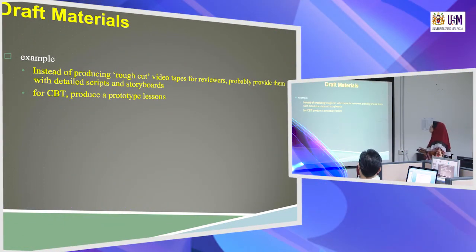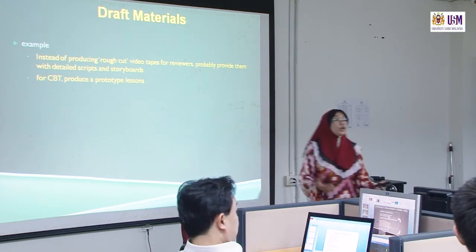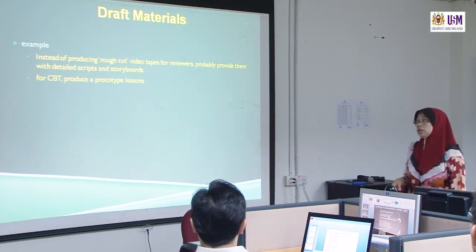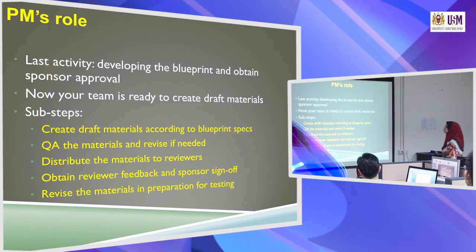For example, instead of producing rough cut videotapes for reviewers, probably provide them with a detailed script and storyboards. Or for CBT, produce a prototype lesson. So you don't have to produce the exact one, but maybe one with the details needed by the subject matter expert or sponsors. Project manager's role: the last activity is developing the blueprint and obtaining the sponsor's approval. Like I said just now, whether they want a big logo or a small logo, or whether they want their logo published during the seminar on the backdrop, for example, you need to have their approval.